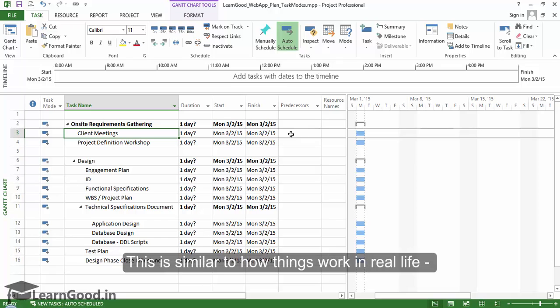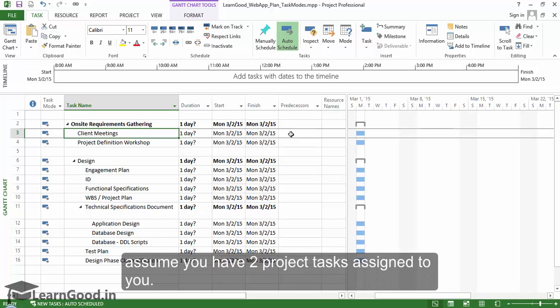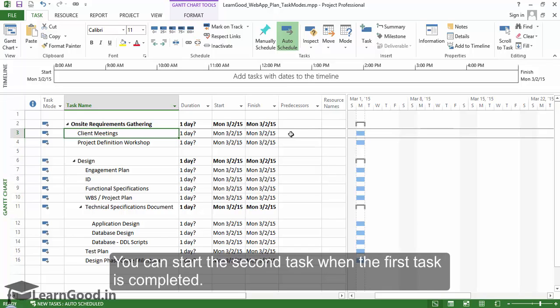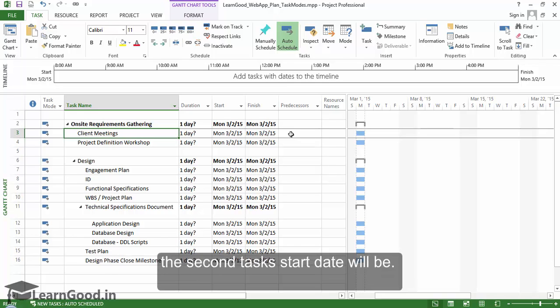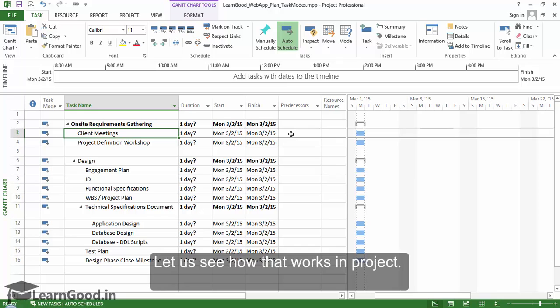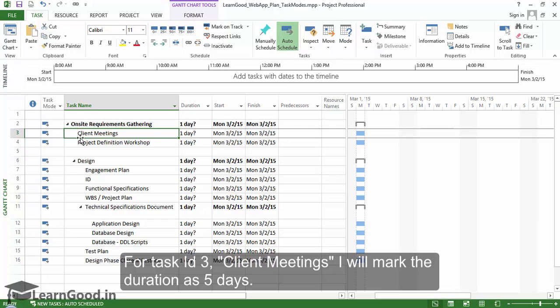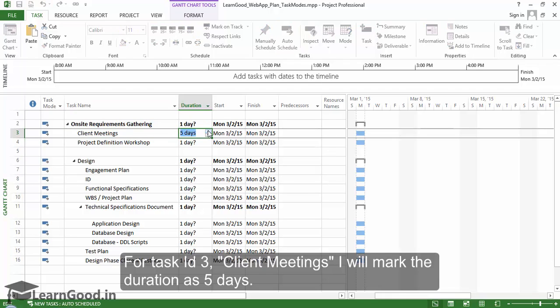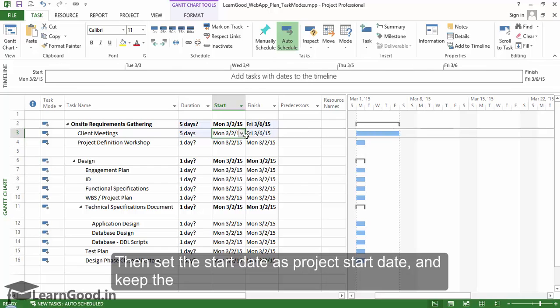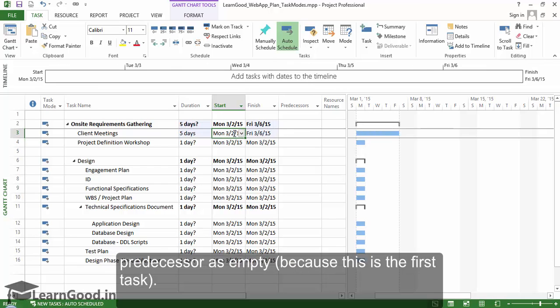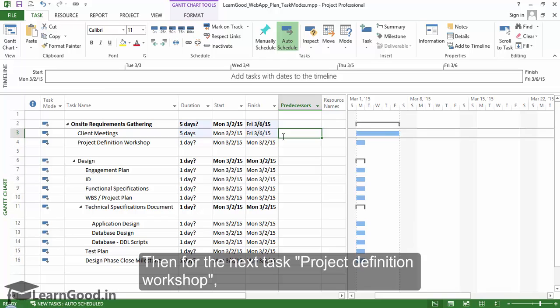This is similar to how things work in real life. Assume you have two project tasks assigned to you. You can start the second task when the first task is completed. So the first task's end date will determine when the second task start date will be. Let us see how that works in Project. For task ID 3 client meetings I will mark the duration as five days. Then I will set the start date as project start date and keep the predecessor as empty because this is the first task.